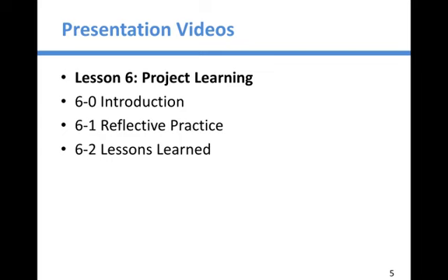And the idea is that a 2-year project, for example, may have maybe 4 sessions every 6 months where the team will get together, look at what happened, capture some of the lessons they learned in the approaches, in the methodologies, in the way they communicated, in the way they manage the project, and then apply those lessons in the next phase, in the next 6 months.